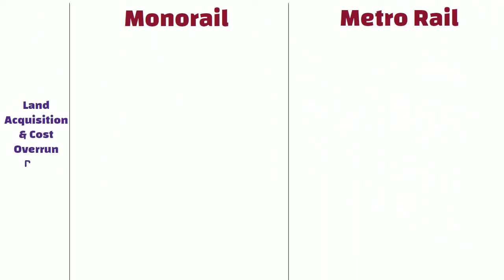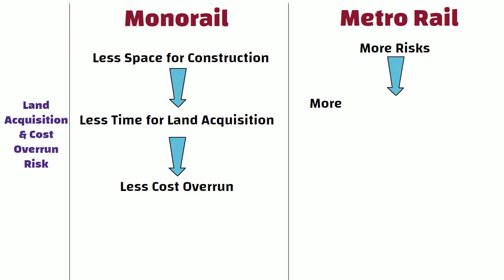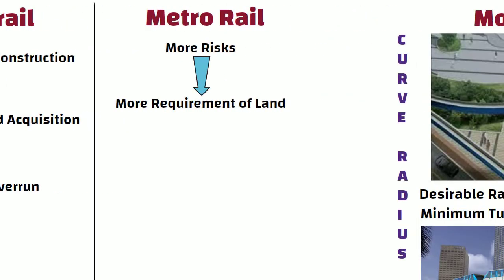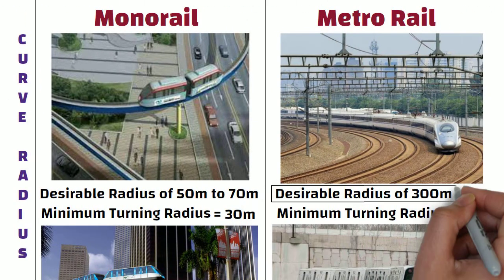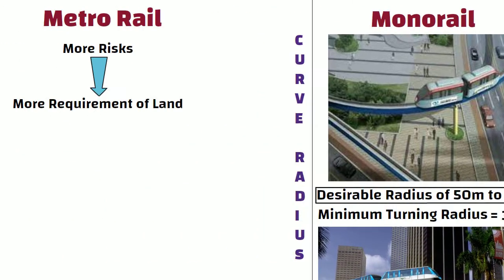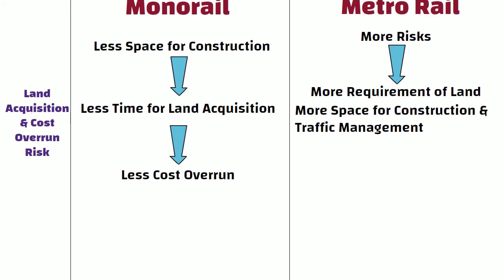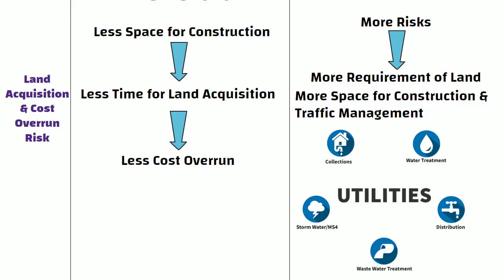Land acquisition and cost overrun risk. Monorail requires less space for construction, hence it requires less time for land acquisition, and due to this, the possibility of cost overrun is also less. Whereas metrorail faces more risks than monorail due to greater land requirements — specially because metrorail requires a desirable radius of 300 meters compared to monorail's 50 to 70 meters. It requires more space for construction and traffic management, and shifting of utilities could also aggravate further problems.